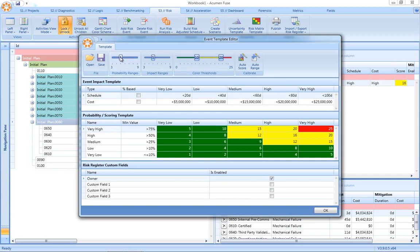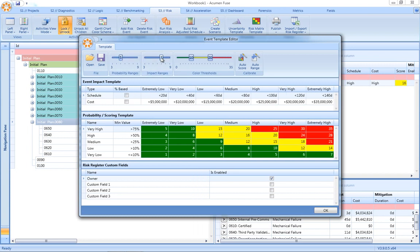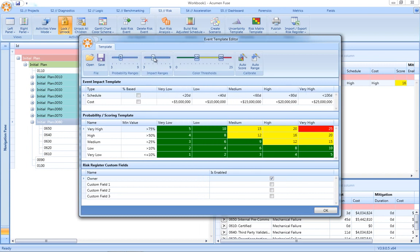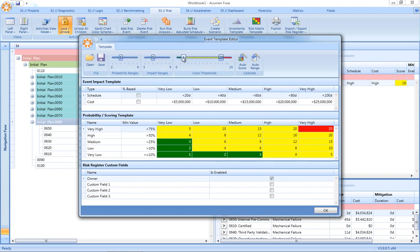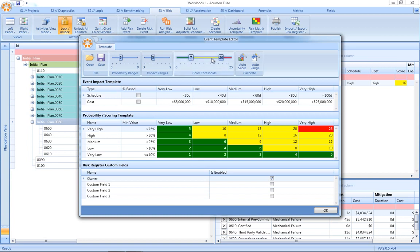We can define the number of probability ranges, impact ranges, and of course, our tolerance to risk through the use of risk thresholds.